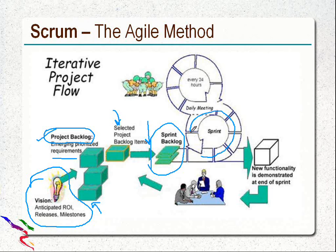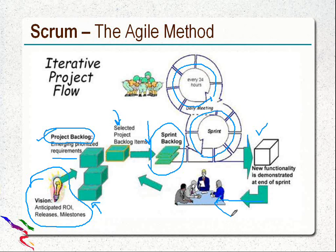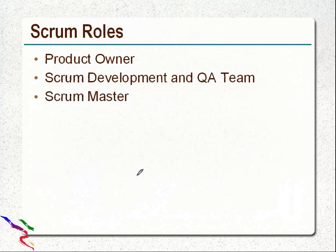This is a sprint of, say, two weeks — ten days. The daily work is continuously monitored: the progress within each day and within this sprint. At the end of this sprint, a testable or deliverable part of functionality of the product committed by the team will be shipped. Before shipping, it will be demonstrated to the product owner so that proper functionality can be finalized and released. If any item is not proper, it will be put back into the product backlog so that it can come with priority for the coming sprint. This is basically an overview of the Scrum agile method.